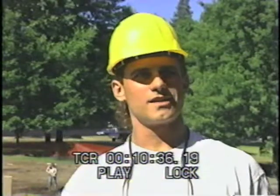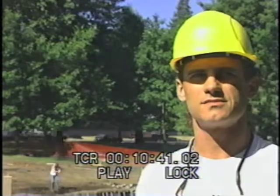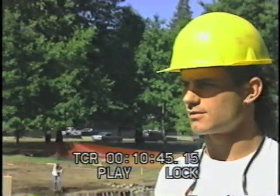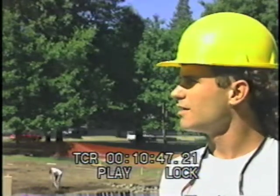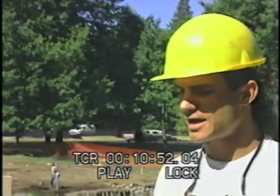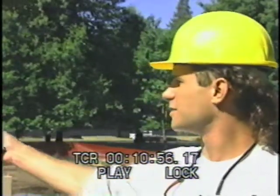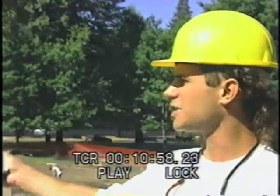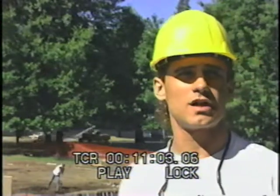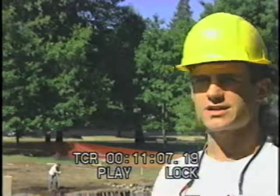So yeah, little things like getting the materials affect the design to a pretty great degree. Do the students participate in the materials and laying out how you go about getting materials? They do a lot of that. In the spring seminar, once we got the design pretty much figured out, we had students sourcing different materials, like the wood that's used in that truss. It's a cedar glulam, and it's really only available from one supplier. It's Alaskan yellow cedar, a true cedar, not like the western red cedar, which is actually a juniper.